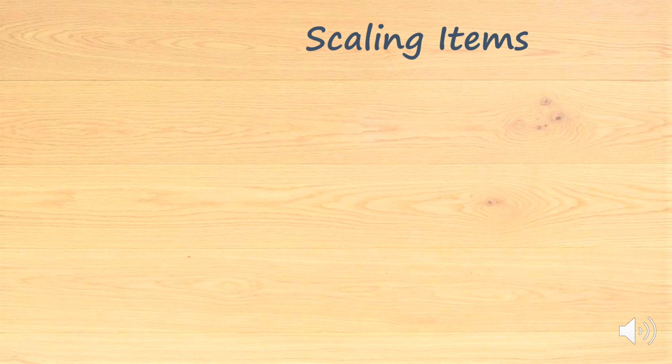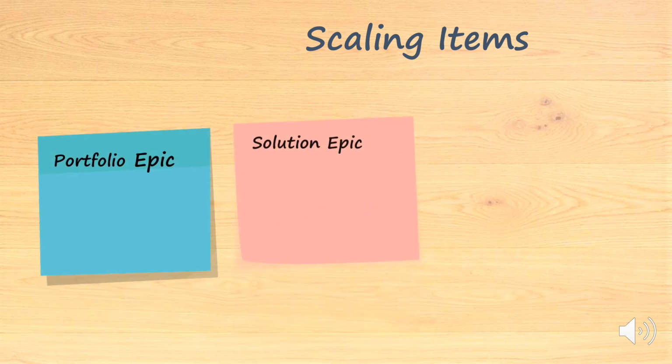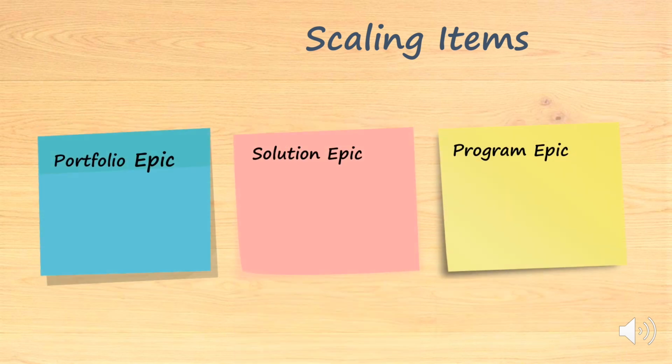Just like described in the SAFe framework, an epic is a container for a solution development initiative large enough to require analysis, the definition of a minimum viable product, and financial approval before implementation. The epics can occur at the level of the portfolio, large solution, or program, depending precisely on their scope. In this model, each of these represents a new type of item in Jira.